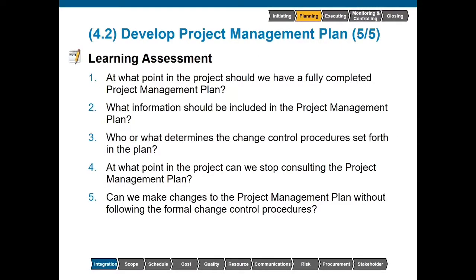Develop project management plan. Learning assessment. At what point in the project should we have a fully completed project management plan? The project management plan will be completed when all planning processes are completed. However, it may change later as the project proceeds.